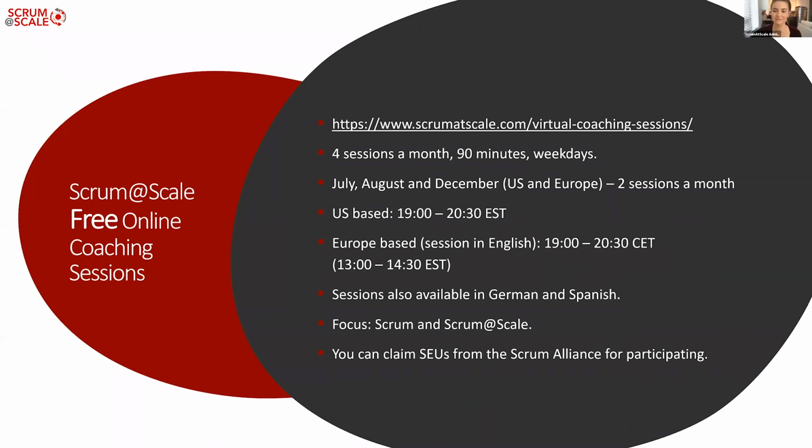So not to my surprise, only, and this is an exact number that I won't forget anytime soon, only 19.3% of the backlog actually mapped to a goal. Wow. So basically 80% of the backlog didn't need to be there. And were they surprised? Yeah, absolutely. So when people claim that they don't have time to do something, I usually ask, are you sure your backlog is actually meeting the company vision and goal? I beg to tell you that probably isn't, unless you can do an impact map that proves that it is. Awesome. Perfect response.